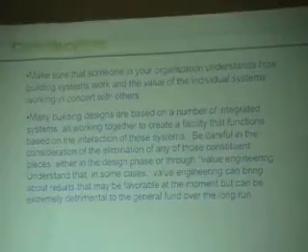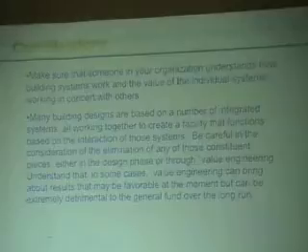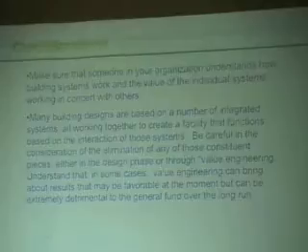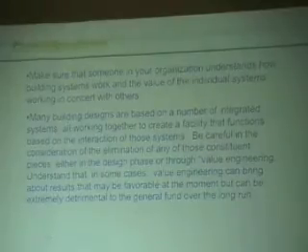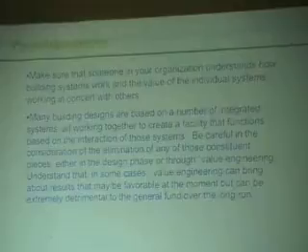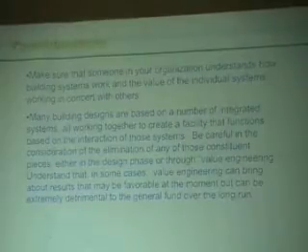Other things in value engineering: we're typically left out of the loop when it comes to saving money in schools. Even wherever you are in a facilities level, you can give all the input you want, but three-quarters of the way through construction, when the contractor says, hey, we're a little over budget here, they don't come to us and say, where can we cut? They make recommendations to the board.